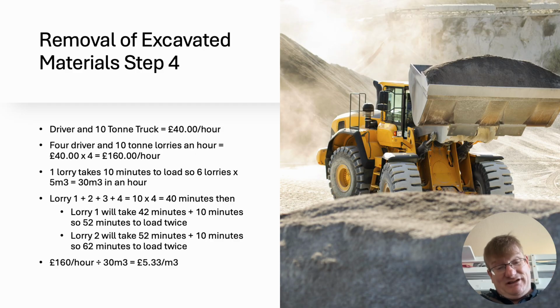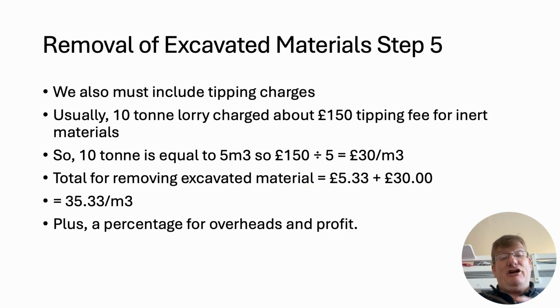Okay. However, and this is the problem, we've also got to include tipping charges. So we've got a £150 tipping fee for inert materials. I took that off the website that was local to me in Birmingham. It can be anywhere. It depends on where you are, on the local authority, and it can be anywhere between £100 and £500. So it was about £150 for inert materials.